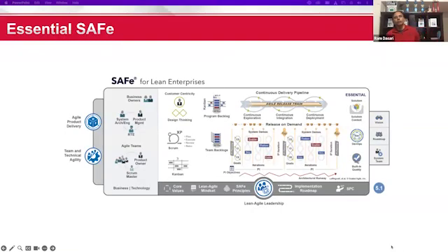So if you are looking at essential SAFe, then you will have those 2 core ones, which is the team and technical agility, which is the way your teams practice, getting into those team level ceremonies, and then working towards doing your planning upfront, iteration planning or sprint planning upfront, getting those iteration goals, and then doing the daily stand-ups, with team members working on each of their stories. Finally they're delivering the code, which gets integrated to the common branch, and then they also try to deliver the value by deploying the code into a staging environment, and then releasing the code into production once it passes all the validation. If they initially use some sort of toggle switches to put it off, they'll release the value on demand to the customer by switching the toggle switches on.